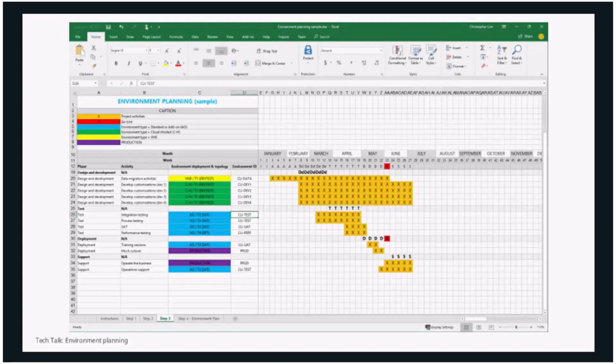Now we have determined the different activities. We can start thinking about, okay, what is the right tier? And if it's a tier 1, what would be the right topology for it? And deployment option. So we know, for example, that each developer must have his own environment. The customer is okay with going with cloud hosted because they will need to install third-party tools that will need the administrator role.